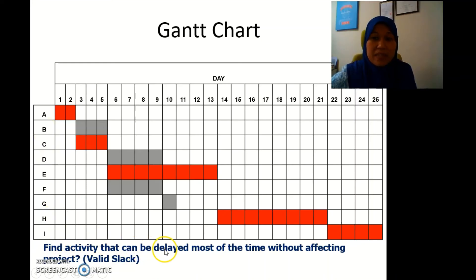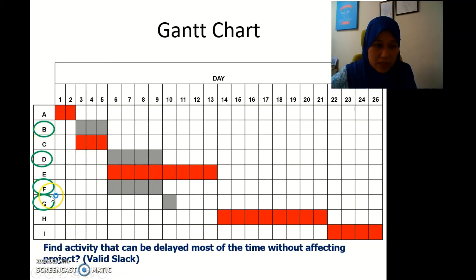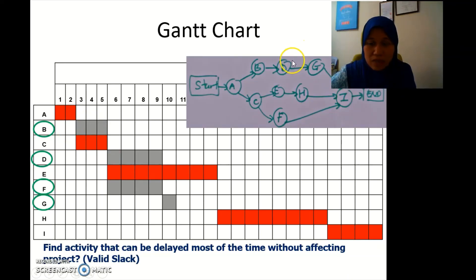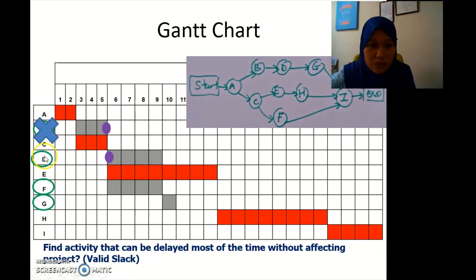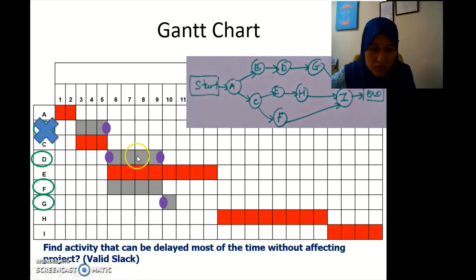Now we check the validity of the slack. The question asks which activity can be delayed the most without affecting the project. We have B, D, F, and G as candidates. Looking at B in the Gantt chart — B goes directly into D with no gap, so B is not a valid slack. Then D goes directly into G with no gap, so D is not valid either.